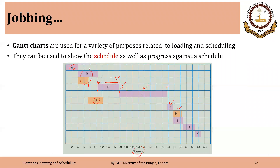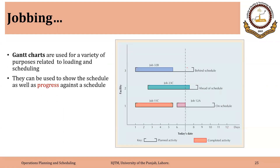The Gantt chart has different formats — it basically looks like drawing on graph paper, and you can see the grid as well. Apart from showing the plan, it can also help you show progress against a plan or schedule. For example, you can see that job 332B is behind schedule, another job is ahead of schedule, and job 12A is on schedule.